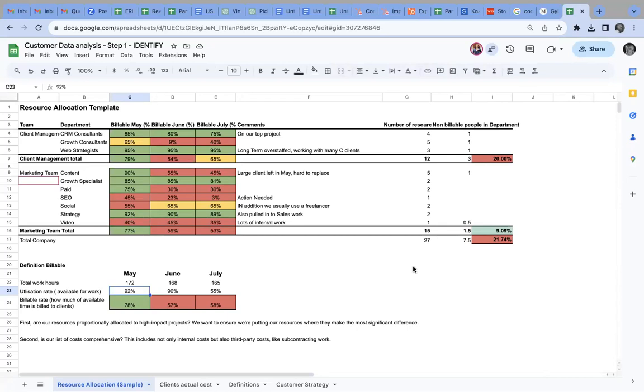The other part with these resource managers that's normally really good is that, let's say you have a Monday meeting where they can see this on a weekly basis and say, how many hours have we filled this week? And then they can see this client couldn't make these 2 workshops, the plan cannot happen. Let's see if we can take the workshop plan for next week and move this forward to this week. So you can sort of fill the week.